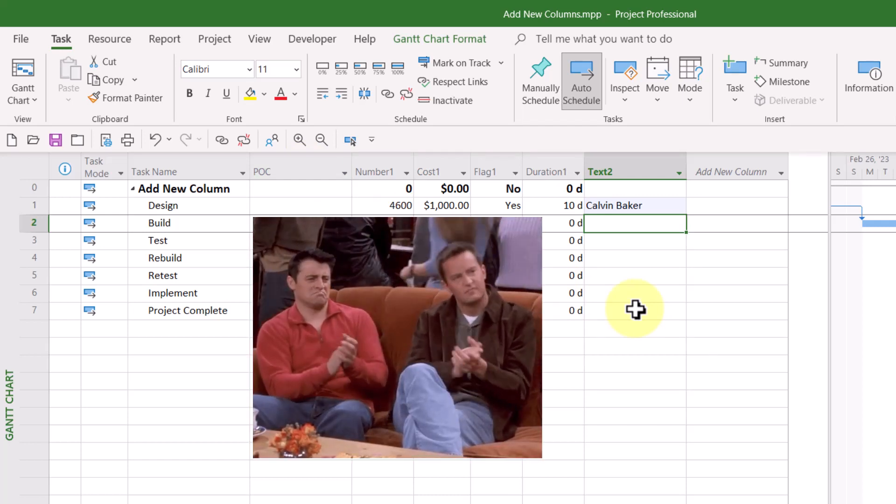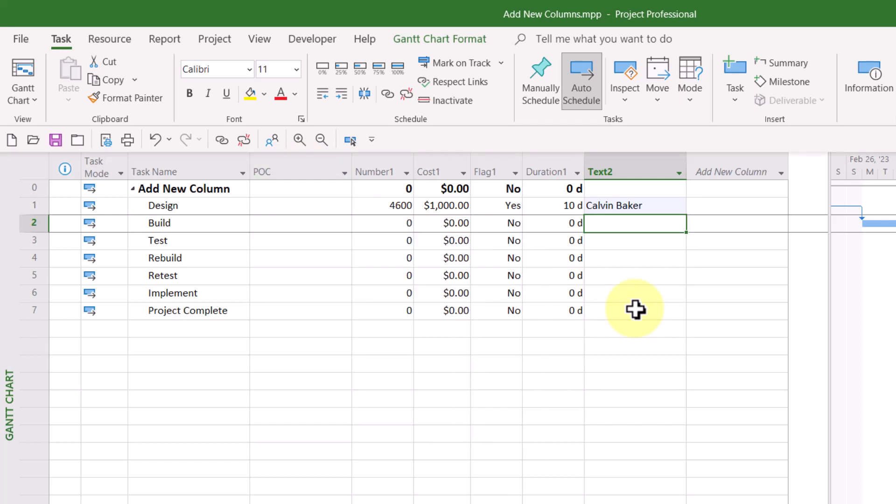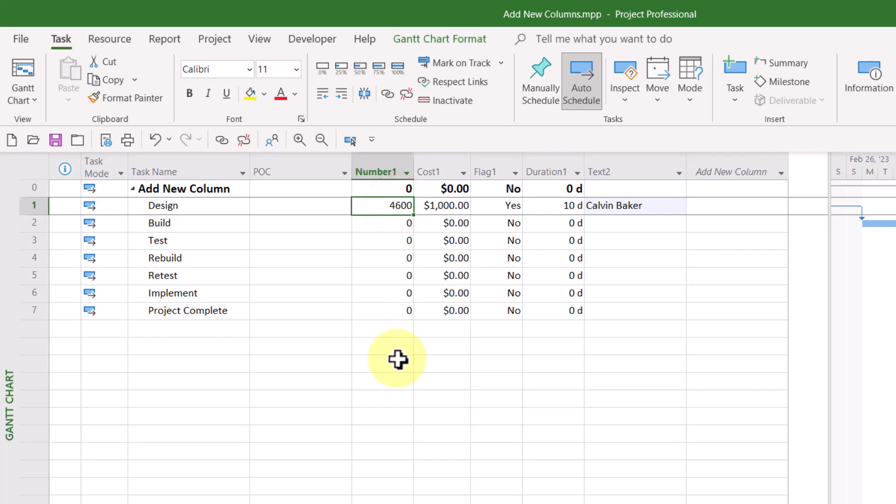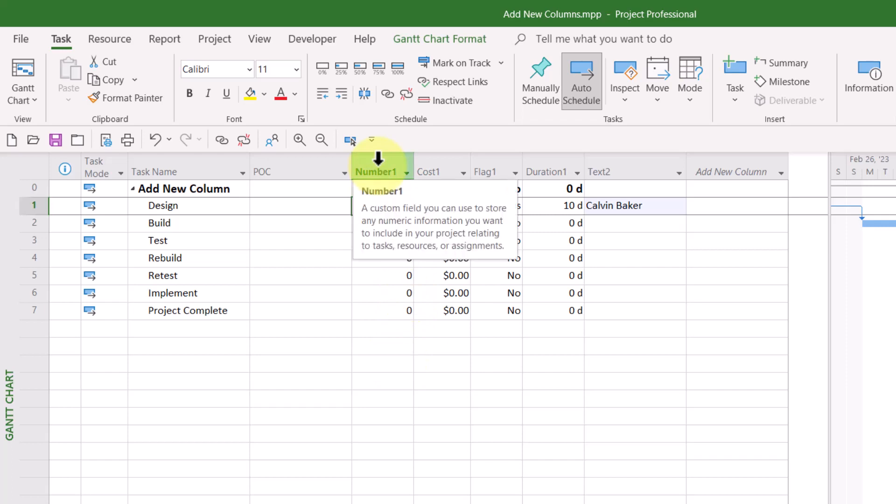Now, there's also some good news for you. If you have inserted a field like number one, but you want to change the data type to something else, it's very easy to do that. For example, in the number one column where I typed 4600, I didn't actually want a number field. I know that I'm going to need to type both numbers and text in the field, numbers and letters. So I need to change number one to a text field. Here's how.